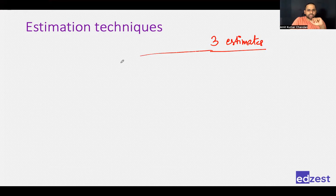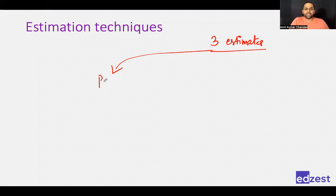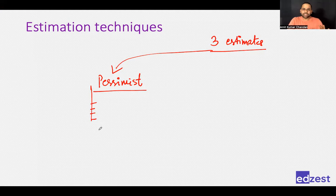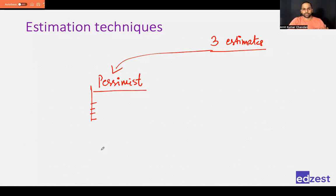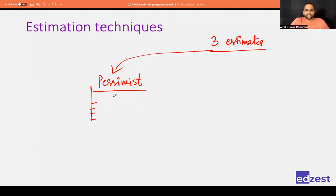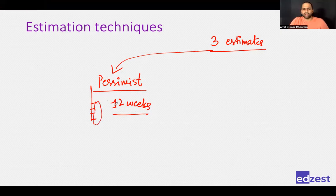We are relying on our team's experience and asking for three estimates instead of one. One is the pessimistic estimate — imagine everything in the project going wrong, all risks happen. What would the estimate be? For example, the team might say this work package will take 12 weeks if everything goes wrong. You take an average of all team members' answers and arrive at 12 weeks as your pessimistic view.